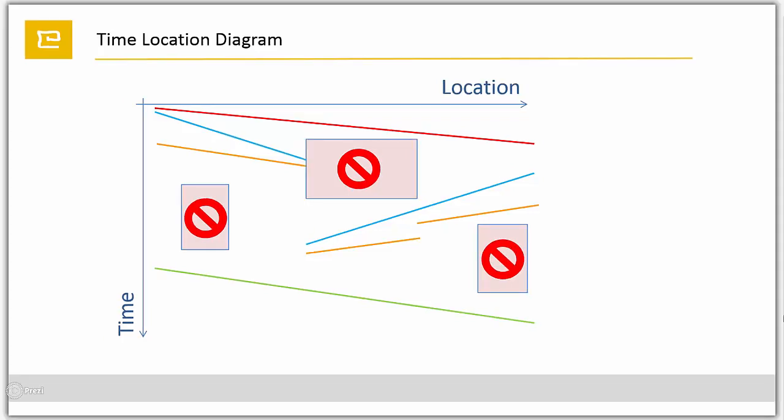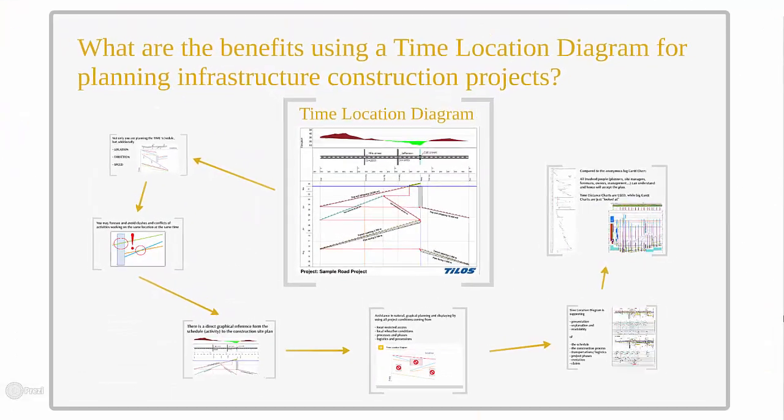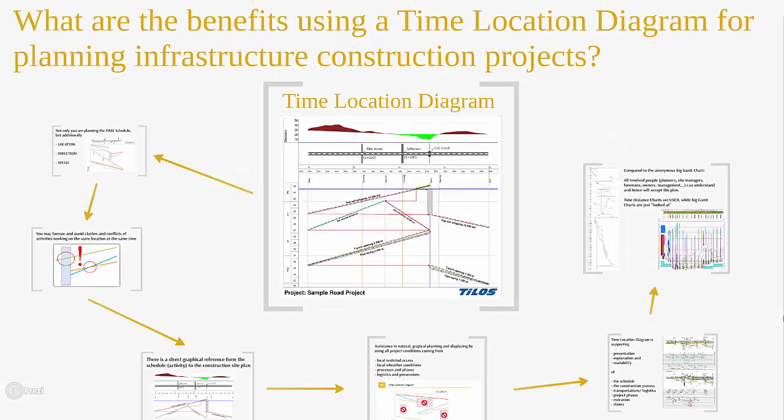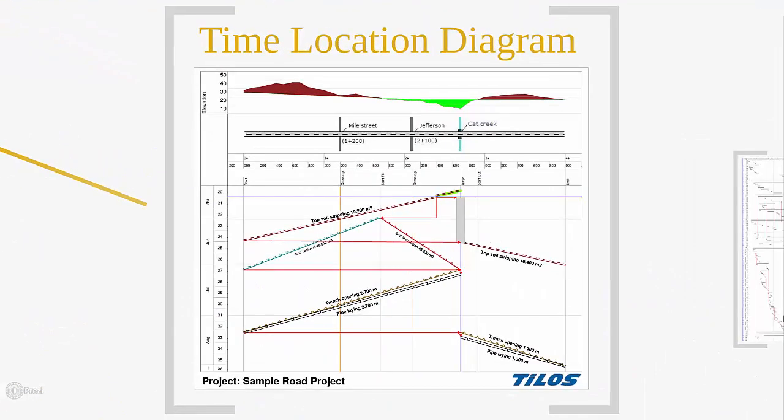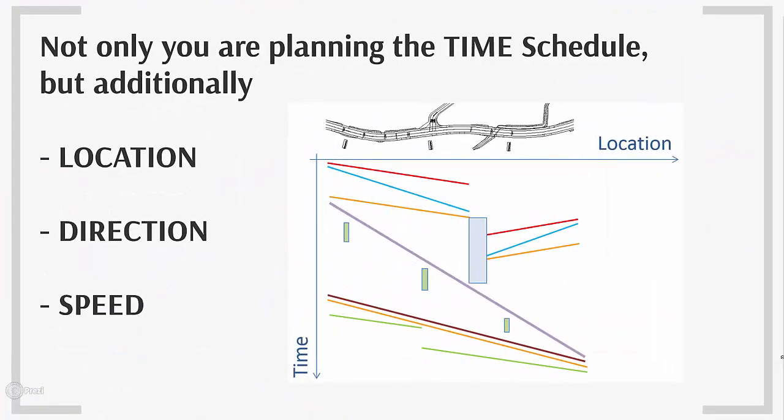Coming so far, now what are the benefits using a time-location diagram for planning infrastructure construction projects? Starting with the obvious from time-location diagram, not only you are planning the time schedule, but also location, direction and speed.